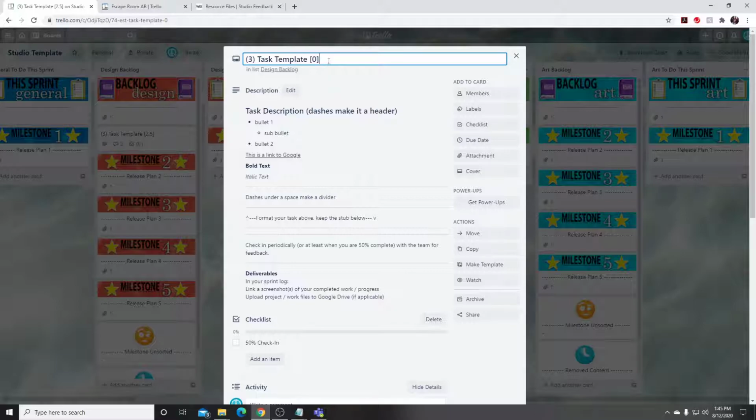People struggle with math sometimes, which is okay, but it does affect the burn down chart when this number is not accurate. The burn down chart takes in this number as an argument to form your ideal trend line at the beginning of your sprint, and then this forms your red line for hours worked, and it also deducts from your blue line for hours remaining. When this number exceeds this number, hours remaining ceases to fall based on this task because this is greater than 100% capacity.